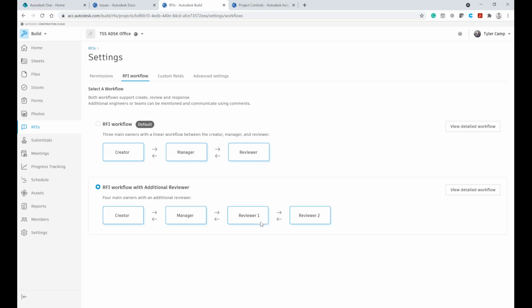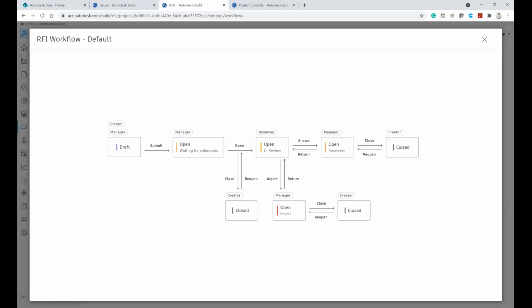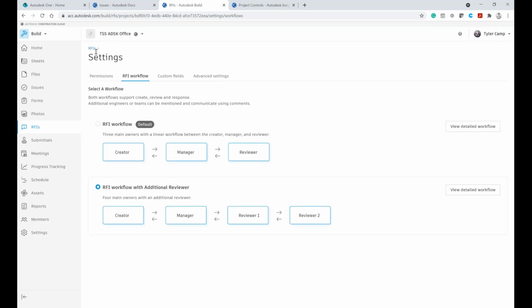Or maybe there's a project that's a government project. You have the ability to add that owner's rep in here. If they want to be a part of every RFI, they can. But I kind of want to show you this workflow, what this would look like. Anyone could create the draft. It goes to the manager, and then the reviewer can be the general contractor or design team, and allow that collaboration to happen, and also with the timeline.